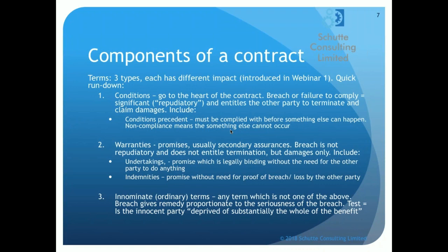A little footnote there on conditions precedent. Conditions precedent is a type of condition. It precedes something else, so it must be complied with before something else can happen. Non-compliance with a condition precedent means that that follow-on task cannot occur. It's a bit like having your logic links in your program. You must comply with a condition precedent before the next task or the next term in the contract can be triggered to take effect.